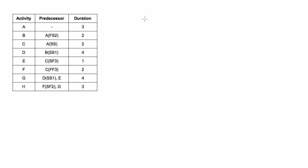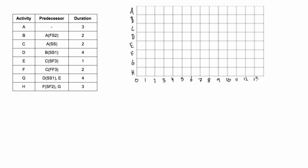First, let's set up our Gantt chart. Our first activity in the project will be activity A because it has no predecessor. It has a duration of three, so it will go from zero to one, two, three - it goes to the end of day three.